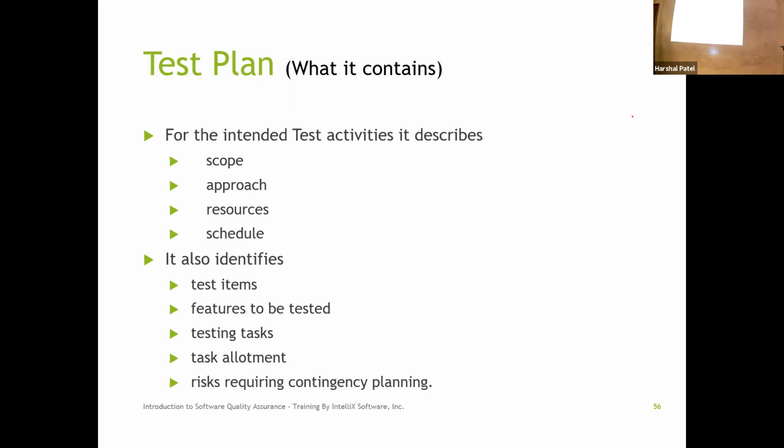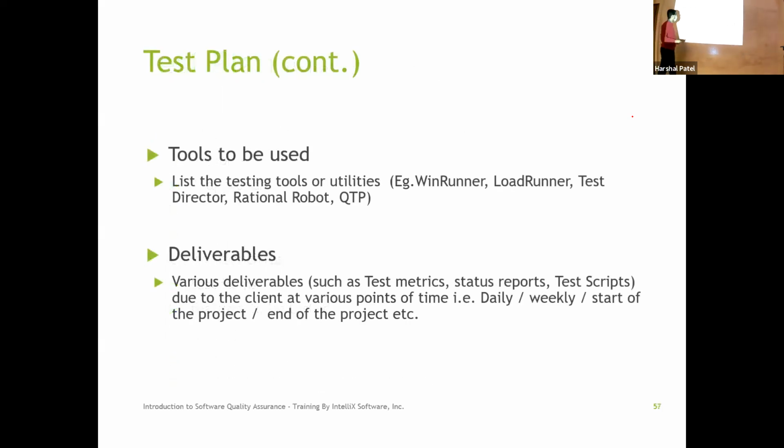The plan to deal with those kinds of risk can be in contingency planning. The other thing is they say, hey, you're going to get this kind of hardware installed and configured and ready for you by this date. And you don't have the hardware. Well, how are you going to deal with that? So you define the various risks and contingencies, and how you're going to deal with them.